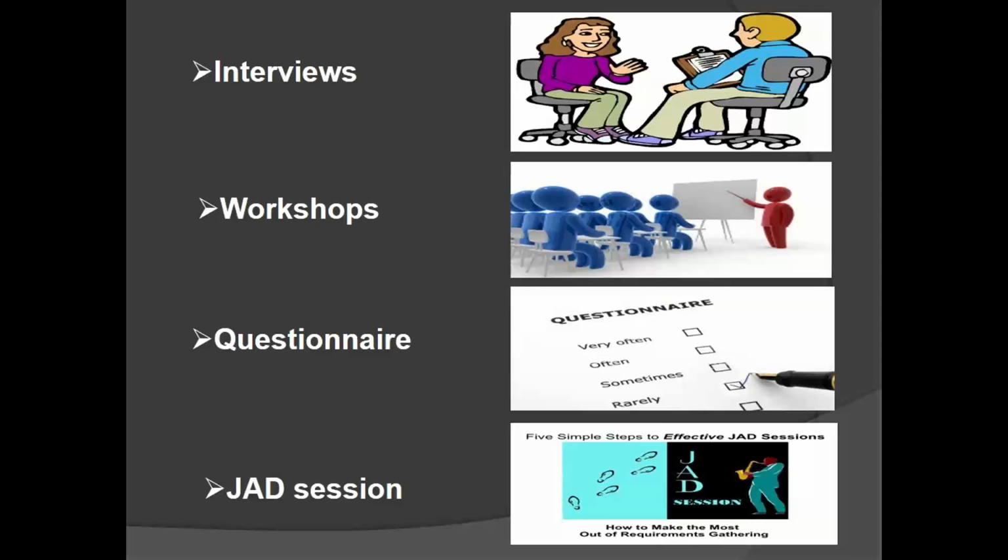But in JAD sessions, the BA takes the developer along while gathering requirements. So the developer also participates in gathering requirements. If the developer has any doubt, there and then he will solve those doubts. So here the entire process is shortened. There is no question of the BA going to the client again to get clarification of those doubts. The developer participates in the requirement gathering.